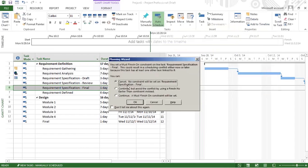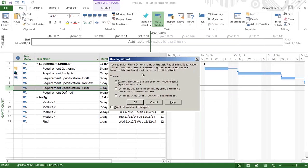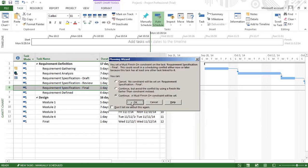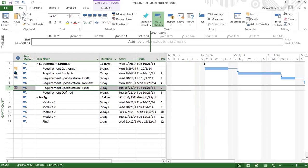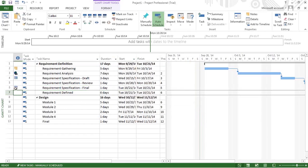A warning appears: If you set a Must Finish On constraint on the task specification, this could result in a scheduling conflict either now or later because this task has at least one other task linked to it.